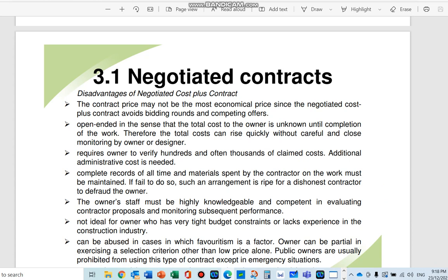These forms are very standard. They list down all the contractual administrative clauses, but they are not specifically applicable for maybe cost plus or remeasurement or full remeasurement. They'll generally be okay for lump sum, fixed price, provisional lump sum, that sort of contract. So these documents need to be fully ready before we can move on to the tendering stage, which we will talk about in the following part 4 recording. Okay? So I hope you all can understand that relationship in the picture.